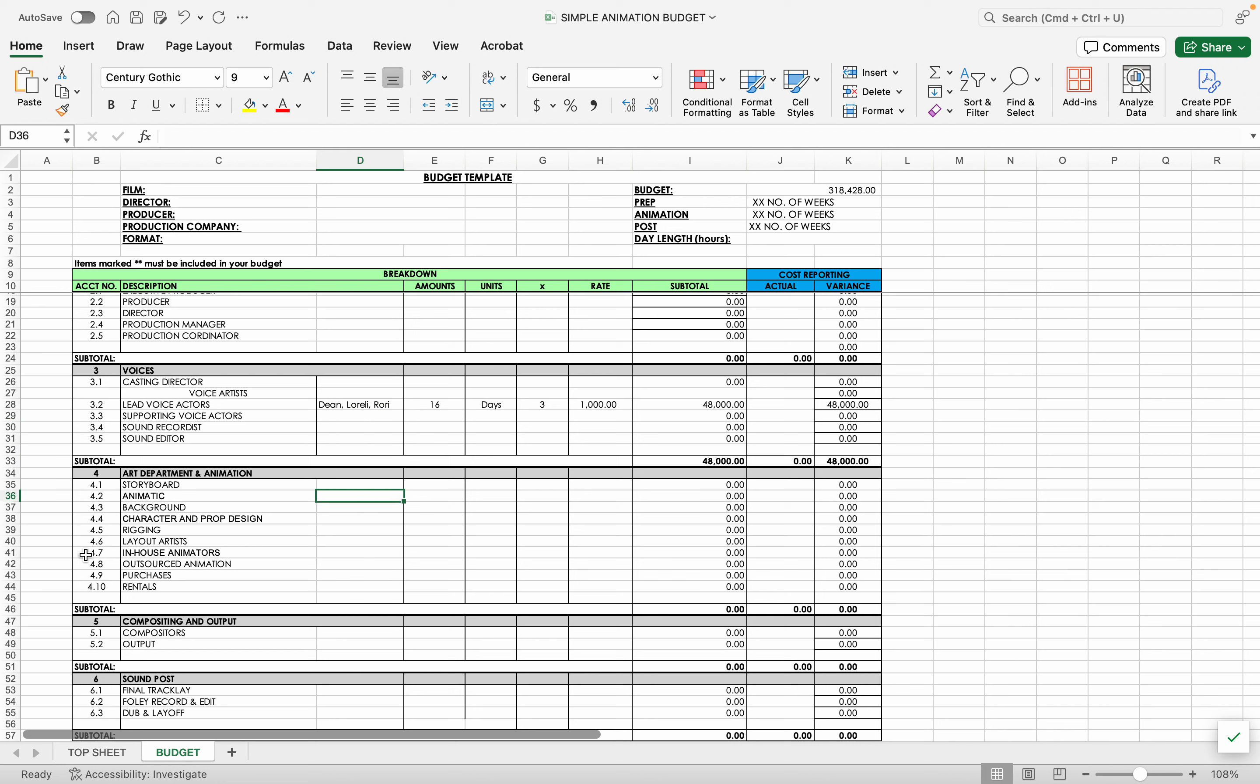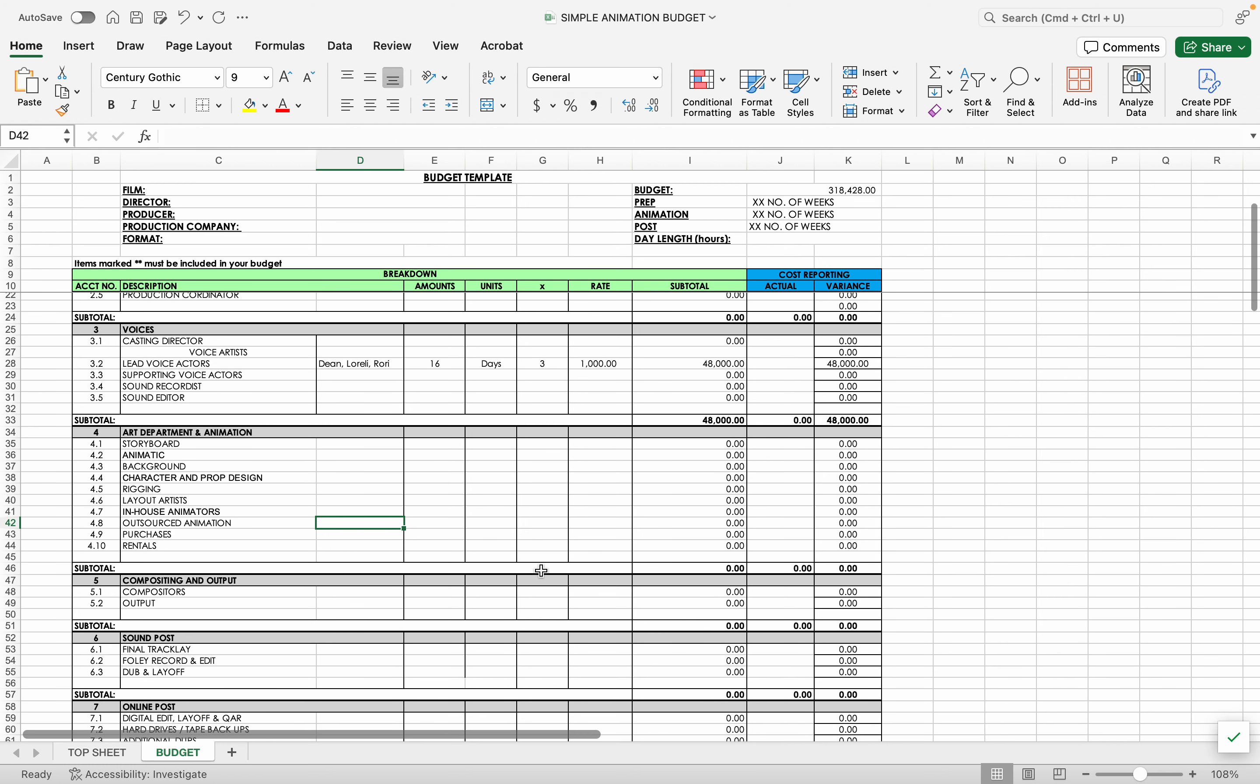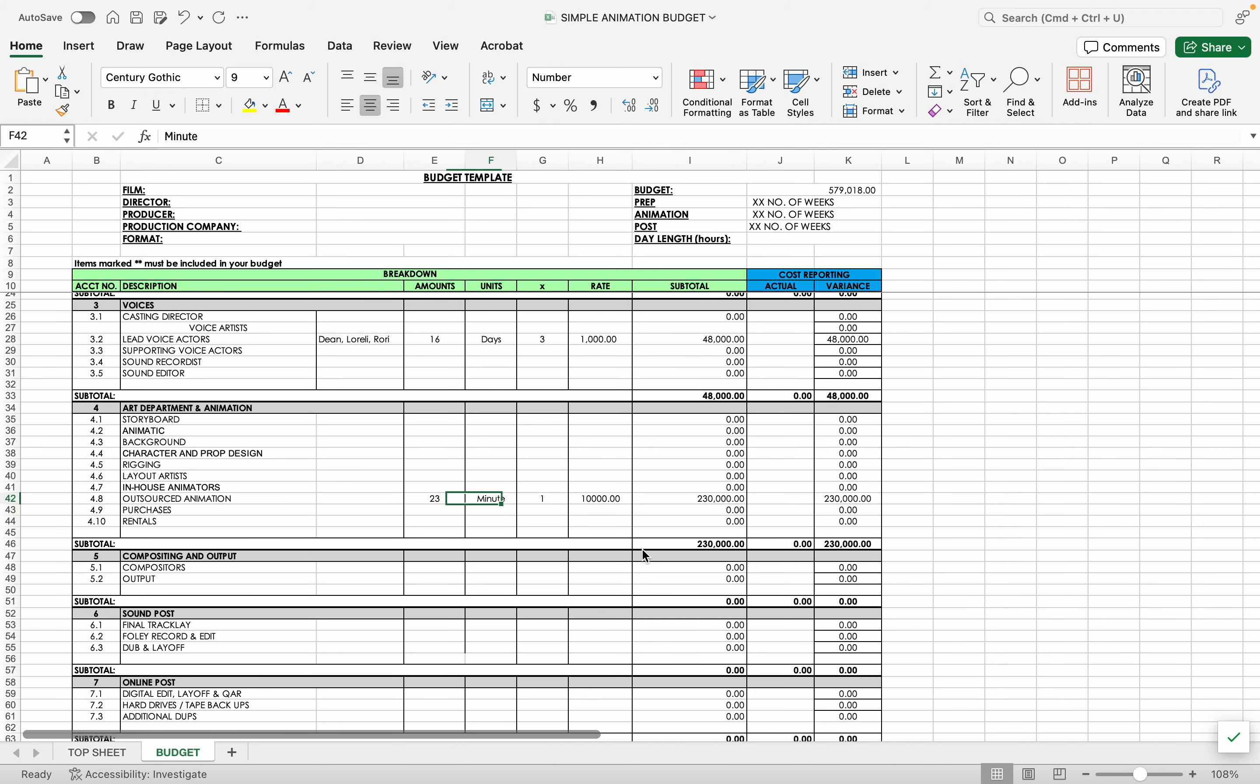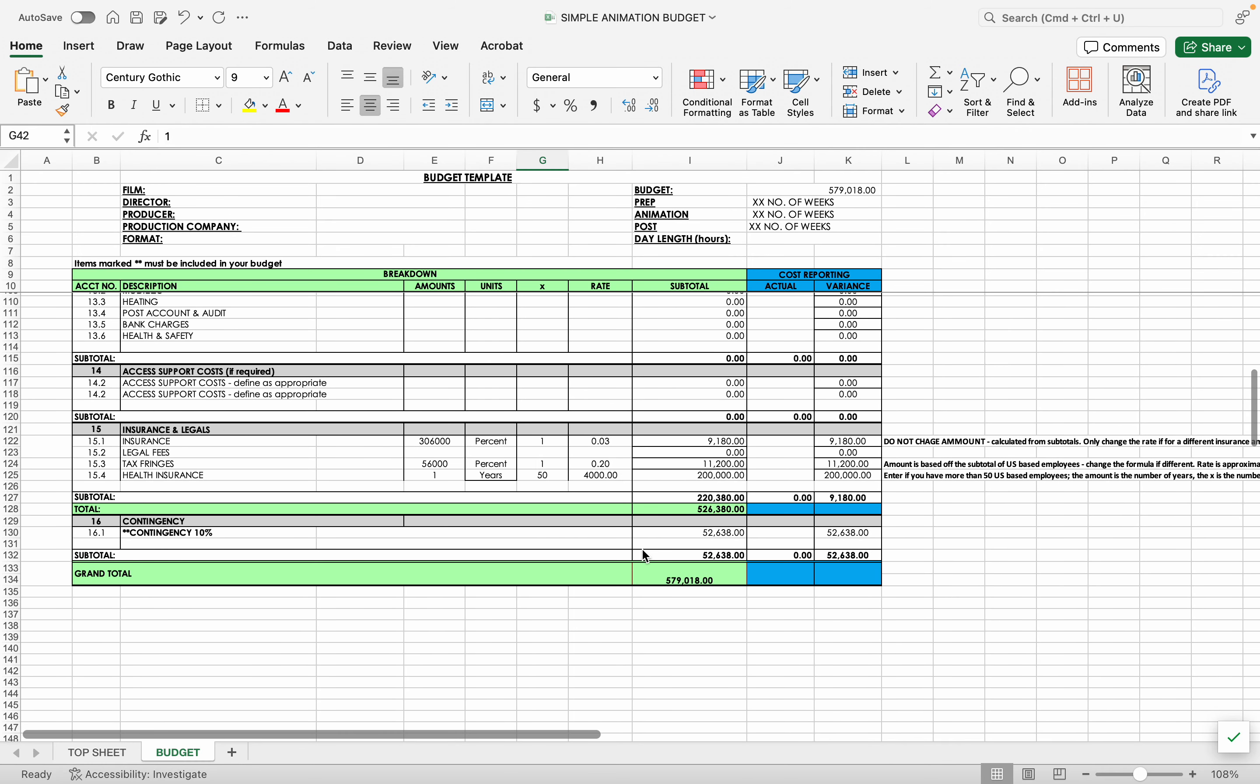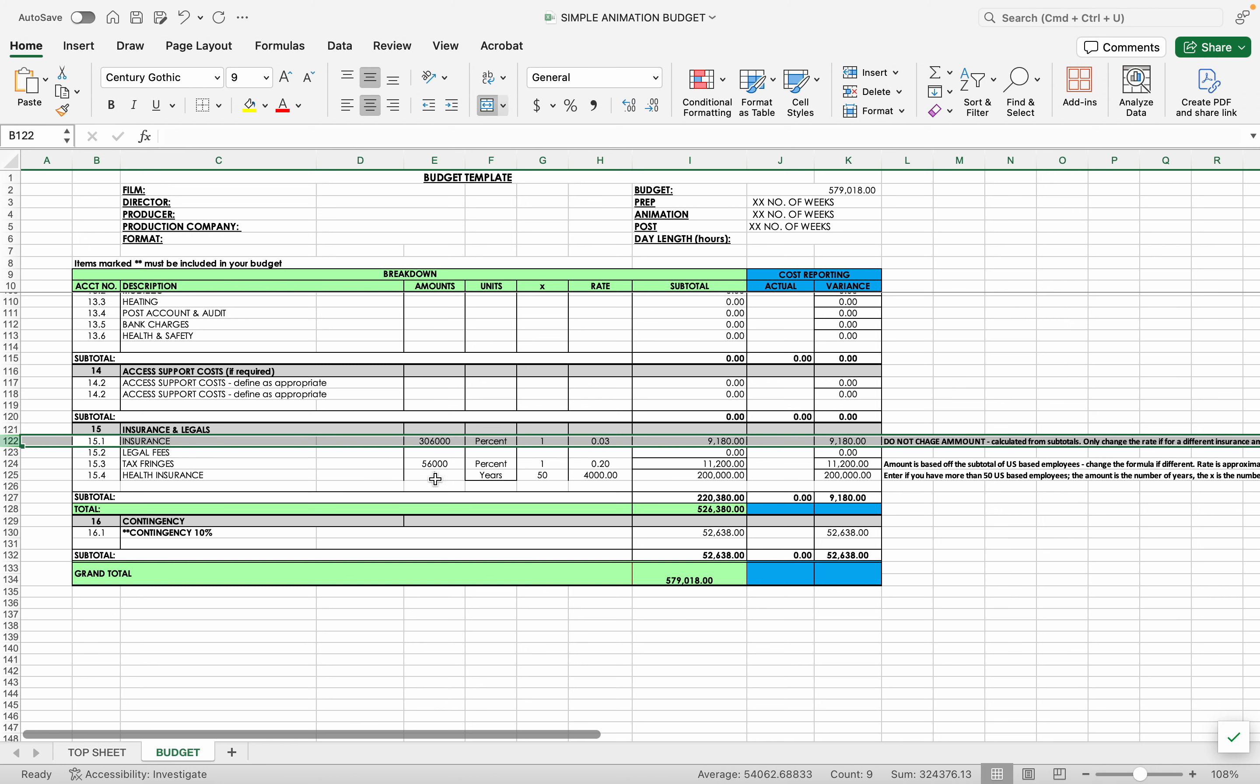Art department. I added a section here for you for outsourced animation. I talked with Professor Ruiz in doing an estimate of $10,000 per finished minute for exported animation is fine for outsourced animation, is a fine estimate for you guys for doing these. So you can do that for outsourced animation. So you would say minute, right? And let's say you have 23 minutes and you're doing this for one episode. So times one, if you were doing this for all your episodes, you do like times 20 and it is $10,000 per minute. Purchases and rentals and outsourced animation, those do not affect your tax fringes because those are not U.S.-based employees. So it's not calculating for that. It does affect your insurance because your insurance is based on your total production budget.